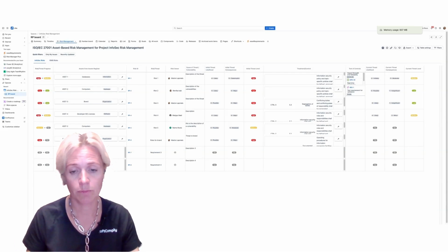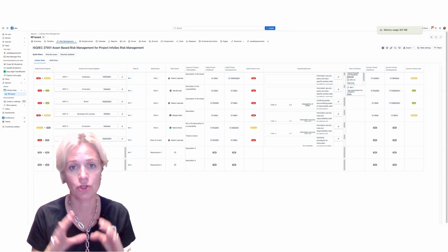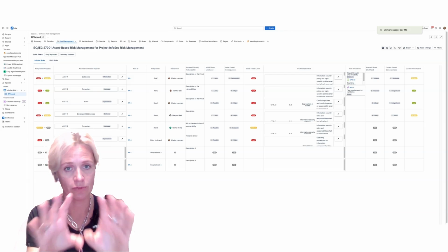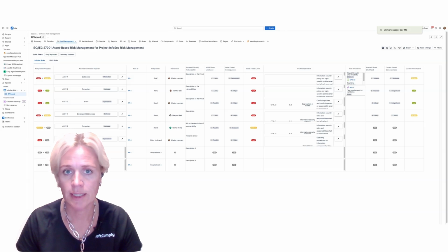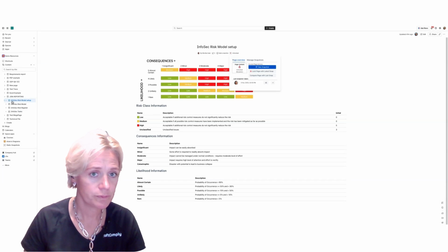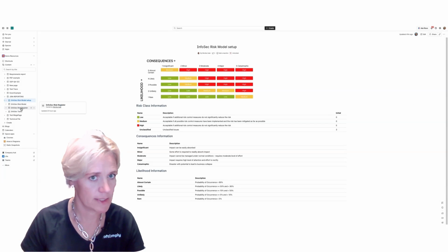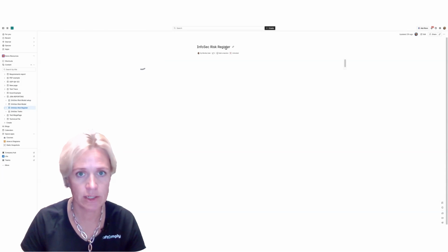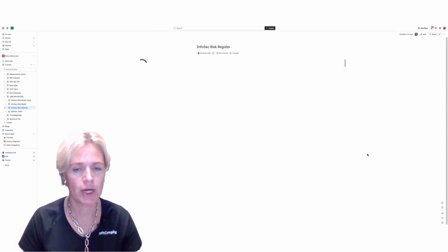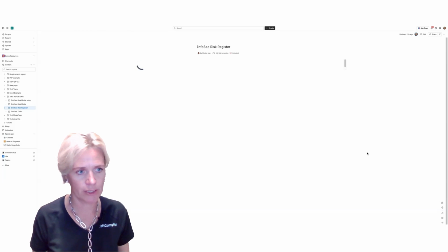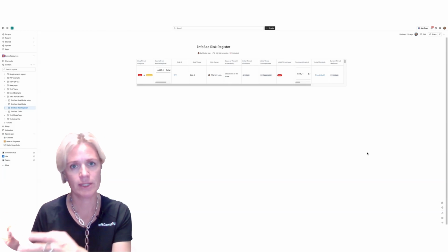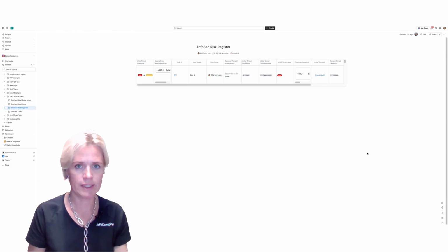We want to put the risk review meeting minutes into a document. And for that, we want to take the status report of this particular table in Confluence. For that, we go back to our Jira reporting in Confluence, and we have a page that we call Information Security Risk Register. And this page has a risk table macro on it that pulls the information from the Software Apply Risk Manager Plus risk table in Jira to Confluence page.